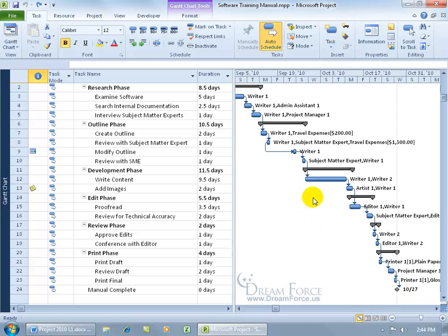So can I delay any one of these tasks without bumping out the project's finish date? I can eyeball it and go, let's see, no, if I push that one, that pushes, well, hey, look at this. This one has quite the delay here, and as you recall, on task 9, we've got this start no earlier than September the 24th. So my guess is that from this task going on down to the end is going to be critical. But this task up above can be delayed, or any one of these tasks, because when you delay this one, that one gets pushed out, you know, if it's by days or weeks or months. Eventually, if it gets pushed out too far, where it goes past the 24th, the start no earlier than, then this whole thing is going to become critical.